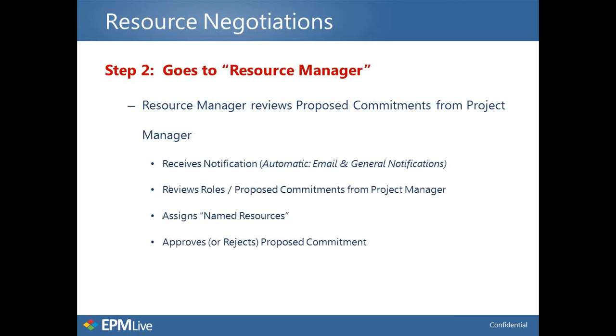Christina will take over, review the notification and the roles and proposed commitments from myself. I'm going to add some generic roles, and she'll swap out those generics for some named resources. So she will fulfill some of those roles. And then she'll approve those commitments.